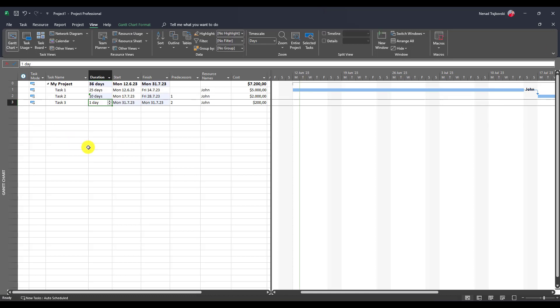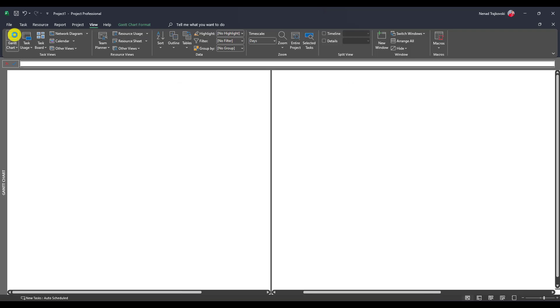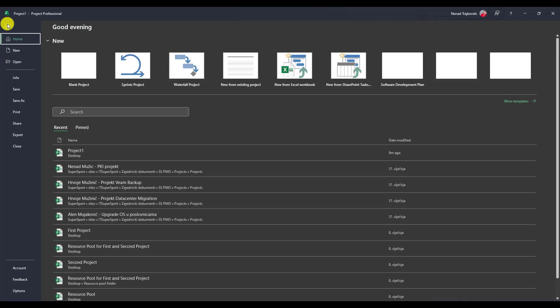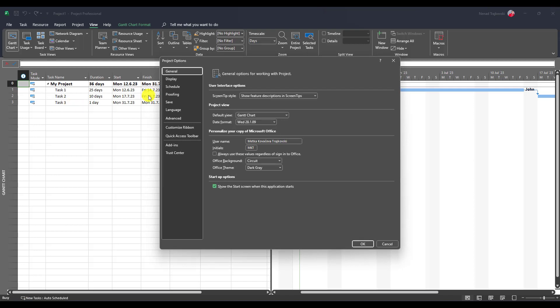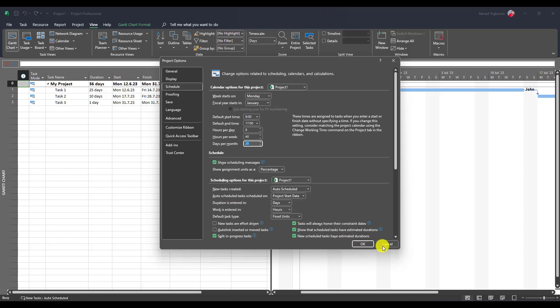Now let me show you how this is calculated. First of all, let's go to resource sheet. John, his standard rate is $4,000 per month. He is working on this task 25, on this 10, and this one day. Now, let me show you how is the calculation done. In file, options, schedule, you see that days per month are 20. So basically, here is said that one month is 20 days.